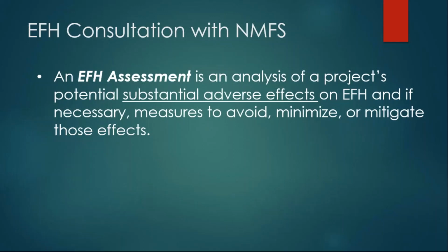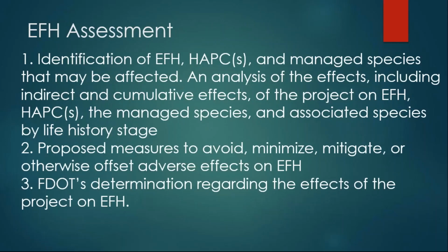An NRE is that document that can be submitted as the EFH assessment to National Marine Fisheries when this consultation is required. The EFH assessment includes the identification of EFH, the HAPCs, and managed species. It also includes proposed measures to avoid, minimize, mitigate, or otherwise offset adverse impacts, and then also those effect determinations regarding EFH.